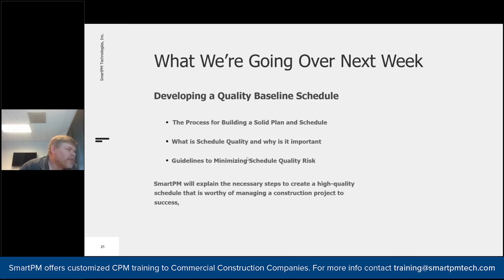Have you found a way to hold material and equipment suppliers accountable for delayed materials or equipment that affect the project schedule? I think that's really on a case-by-case basis. It depends on the contract between the contractor and the owner, and contractors are generally signing up for some risk. But these days with the supply chain issues, contracts can change slightly because it's very difficult to forecast any sort of supply chain issues. So there could be verbiage in a contract that could alleviate the damages to the contractor for those issues. But at the same time, you may have a contract with your material vendor that puts them liable for damages, if you do negotiate that.